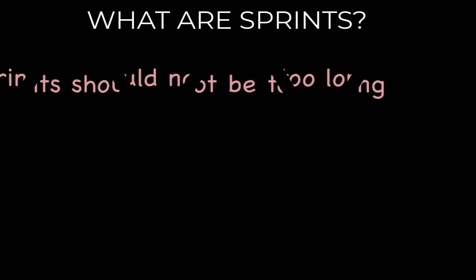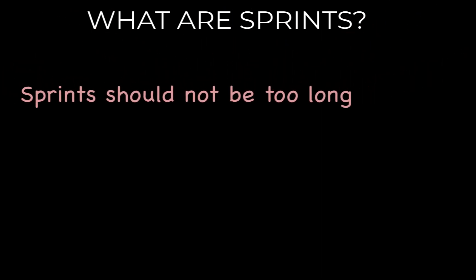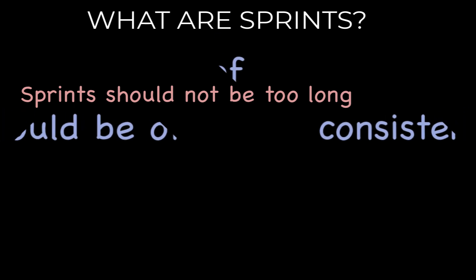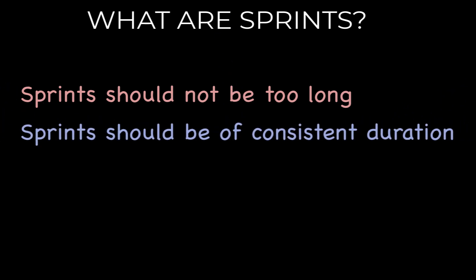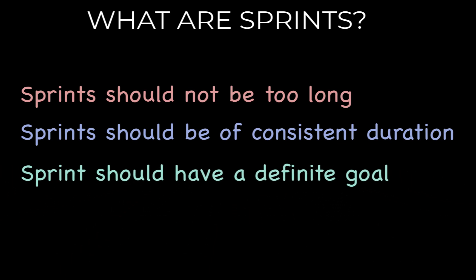Sprints should not be too long. A sprint's duration should be limited to a few weeks. Consistent duration. A sprint should be of same duration throughout the project, except for a few exceptions like holiday time. Goals state the business purpose of the sprint and hence, once decided should not be changed.